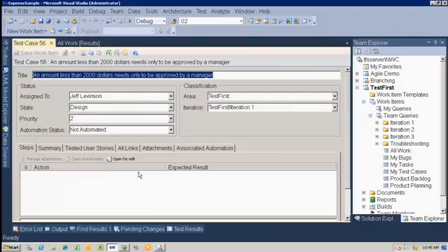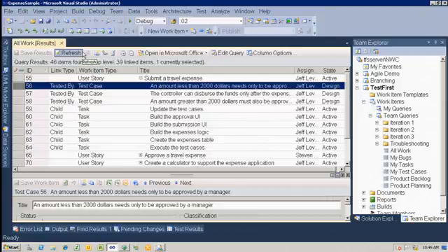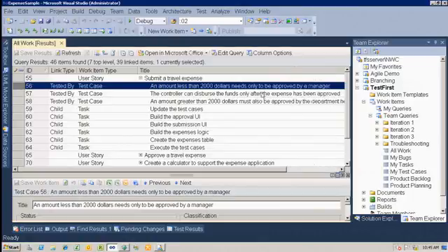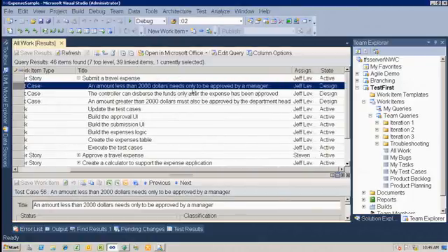Wow. Okay, that's a little lower than what I thought. Three people raised their hands. If you don't know what you're trying to achieve, you can't achieve it. You can't hit it. So right at the beginning, just by creating test cases, I already know that in submitting a travel expense, I as a developer need to do three things. I need to have it approved one way if it's less than $2,000. I know that the financial person can't disperse money until it's been approved, and if it's more than $2,000, not only does the manager have to approve it, but the department head has to approve it.